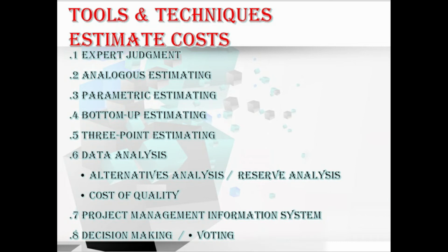Okay, moving to the next estimating technique, bottom-up estimating. This is a method of estimating a component of work. In this, the cost of individual work packages or activities is estimated to the greatest level of specified detail. That is, the detailed cost is then summarized or rolled up to the higher levels for subsequent reporting and tracking purposes. Okay, moving to the next estimating technique, the three-point estimating technique.